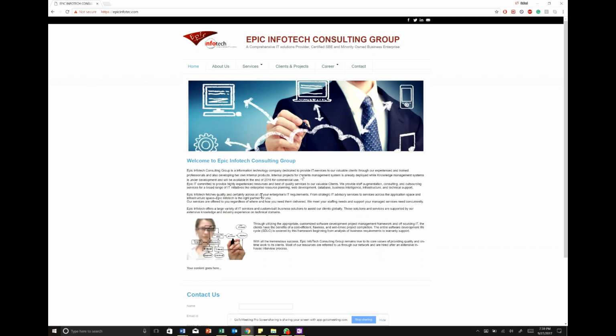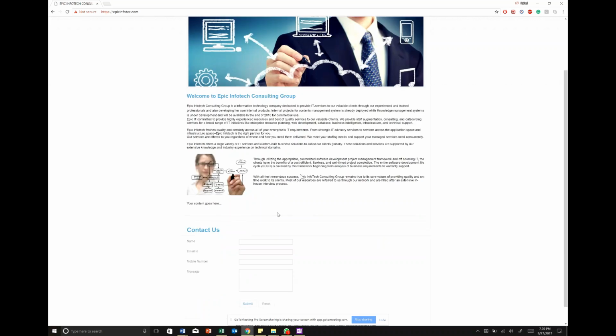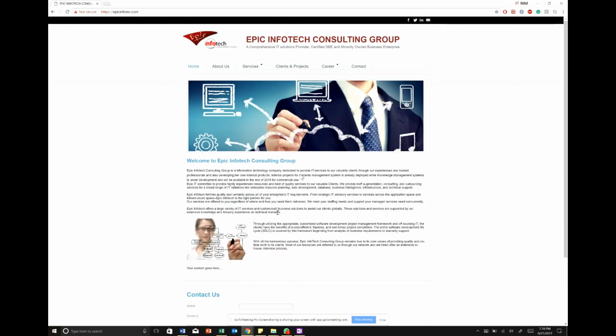Everyone, at least a minimum of 3 user stories. 2 or 3 would be okay. At least try to create 3 user stories. Create one, then think about how you can split it. Like I explained, one user story can be just: as a user I want the contact tab clickable.